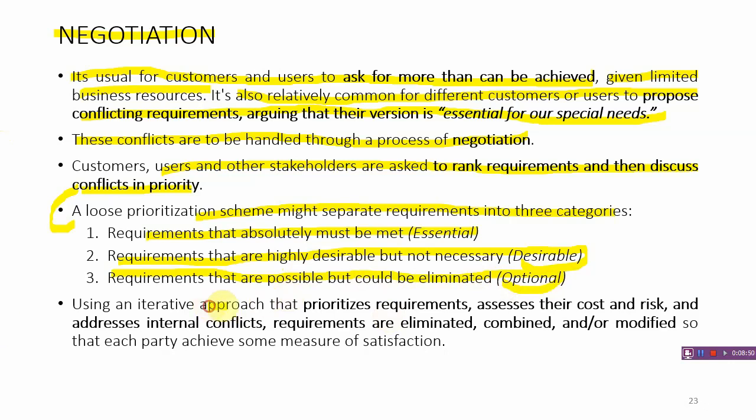Using an iterative approach that prioritizes requirements, assesses their cost and risk, and addresses internal conflicts, requirements are eliminated, combined, and modified so that each party achieves some measure of satisfaction.